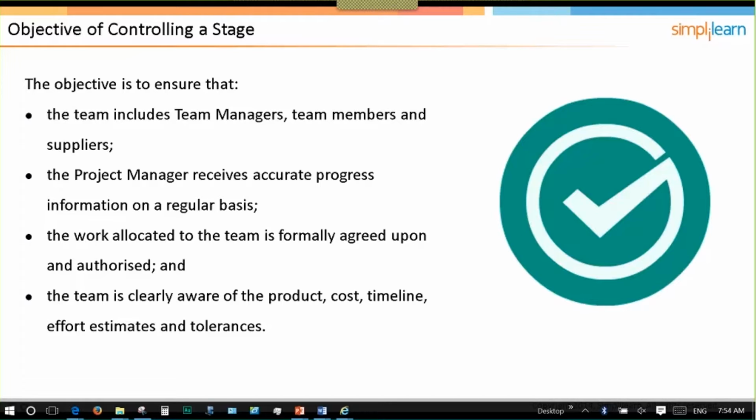Pranav has a good point here as well. It does help you from that perspective, but PRINCE2 still applies. And as Pranav is saying, we usually want to get the sign off on what we're doing in that sprint or in that 2 or 3 week period. So it's almost like you're getting that work package approved as you go along.